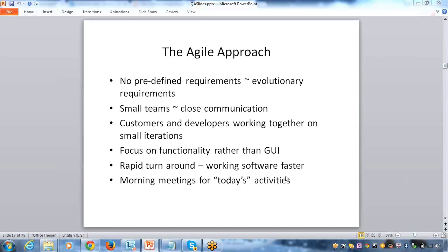Okay, and here, Anu, you are talking about Scrum and all. Morning meetings for your 2 days' activities. Just now I said that every day you are having meetings, and in that meeting you will talk about what you have done yesterday, what is the plan for today, and what challenges you faced. What can be the solution for each and every challenge? Those things will be discussed in the everyday meeting. And as you said, Anu, it can be your scrum meeting or it can be a daily stand-up meeting. It can be called anything. Both are the same.